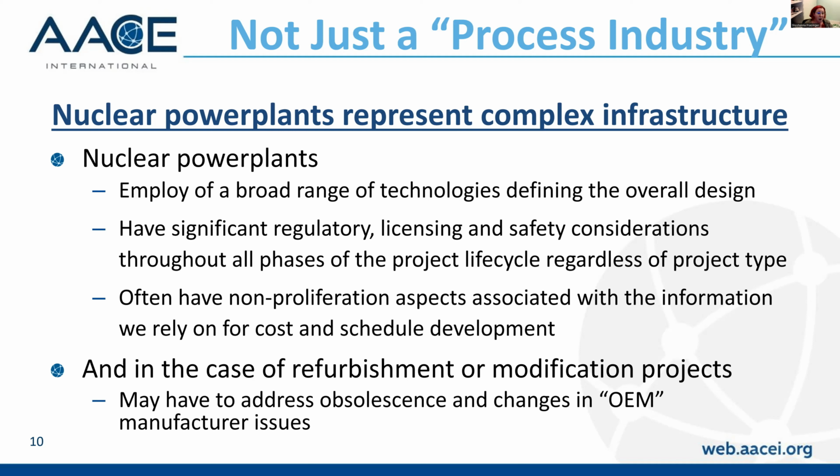The trends in costs have significantly varied in magnitude and in structure by era, country, or experience. For example, in contrast to a lot of the rapid cost escalation that characterized nuclear construction in the US and Canada, we can find evidence in the background of other projects globally that there is much milder cost escalation in some of these other countries.